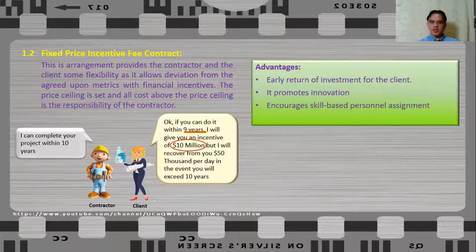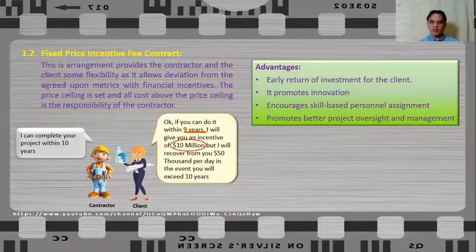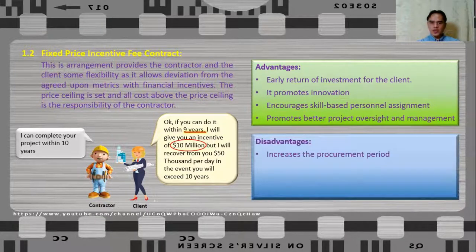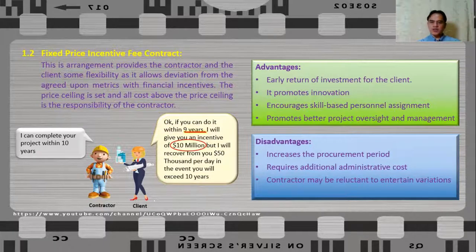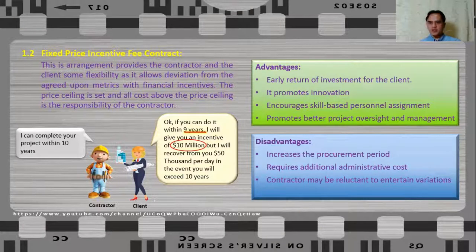The advantages of fixed price incentive fee contract include: it may result in early return of investment for the client; it promotes innovation; it encourages skill-based personnel assignment; and promotes better project oversight and management. The disadvantages are: it will increase the procurement period, because extra time is needed to negotiate and agree on the metrics and incentives; it requires additional administrative costs; contractors may be reluctant to entertain variations as these may prolong the project; and it increases the risk of dispute.